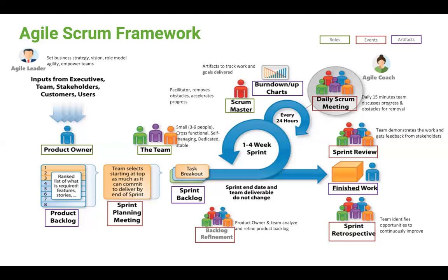Yes. What did you do yesterday? What will you be doing today? Then any impediments we want to know. And that's the role of the Scrum Master, to make sure that impediments are removed. Does that make sense? So after they have done that for the 2 weeks, on the last day of the